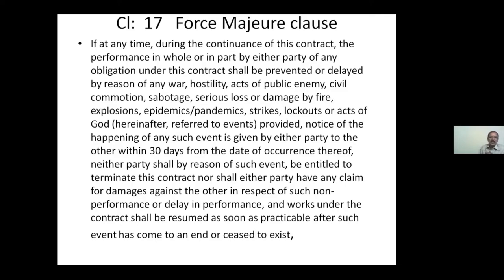So neither party shall, by reasons of such event, be entitled to terminate this contract. So railway should not terminate, nor the contractor should request for closure. Railway should not terminate the contract, nor the contractor should request for the closure of the contract. They have to wait for these conditions to become normal.